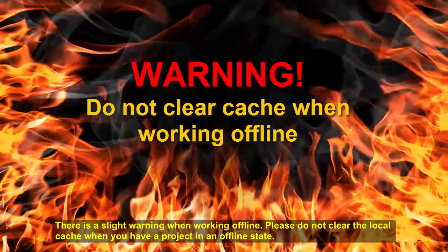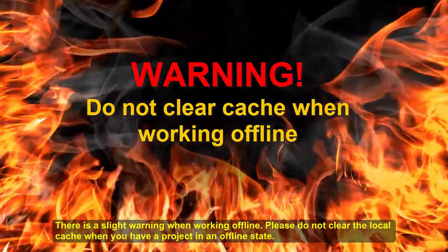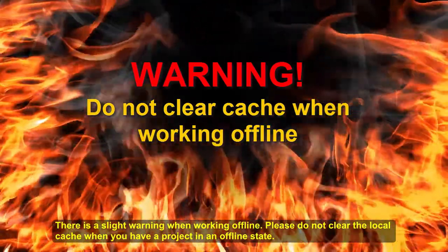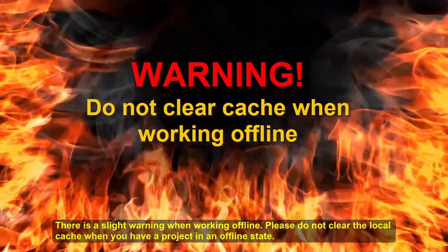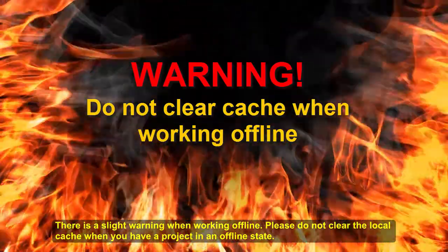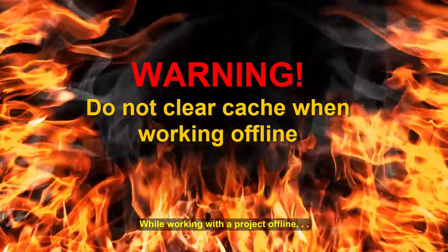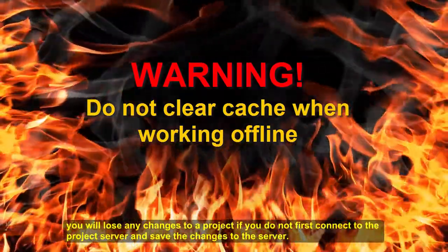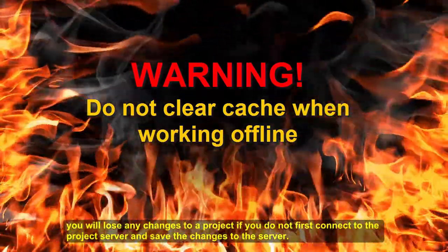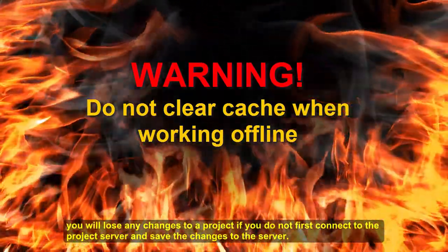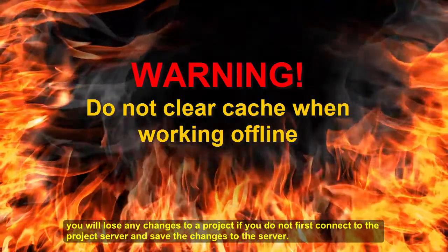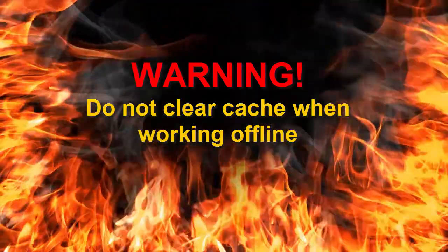There is a slight warning when working offline. Please do not clear the local cache when you have a project in an offline state. While working with a project offline, you will lose any changes to a project if you do not first connect to the project server and save the changes to the server.